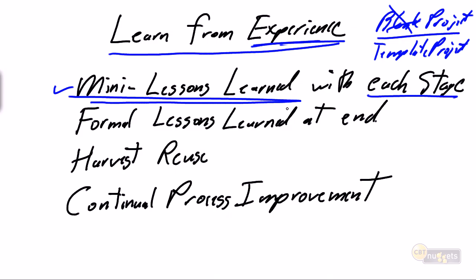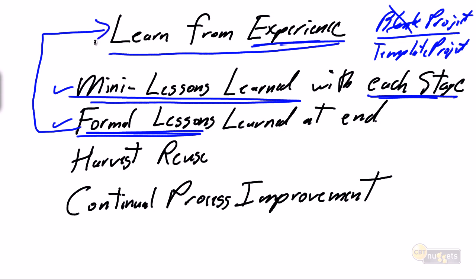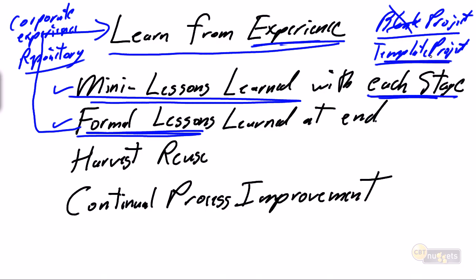Typically, many lessons learned simply get baked into the plan for the next stage, but at the end of a project, we need to have a formal lessons learned, and those formal lessons learned need to be baked into the corporate experience or the corporate repository. A shared drive, a SharePoint site, a formal place for sharing projects' lessons learned so that everybody can be starting from some degree, some form of template.